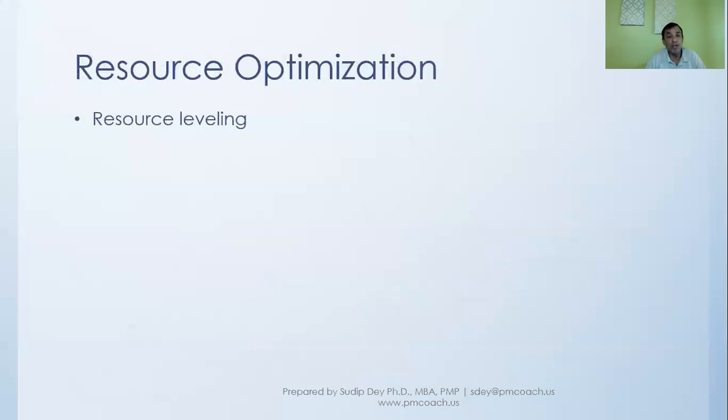We are talking about PMIS, Project Management Information System, some software where we'll put in all the data, and that particular software will do all this scheduling, will develop the schedule for us. Having said that, when it does, you will find, based on what input has gone in, based on the sequence that you put in, there are things that you need to do because it might have broken some constraint. And this is where the resource optimization comes in.